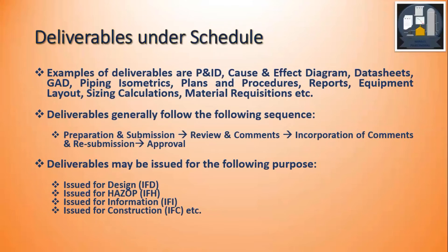The deliverable generally follows the approval sequence described previously. Every deliverable has an objective, and it may be issued for the following purposes: Issued For Design (IFD), Issued For HAZID (IFH), Issued For Information (IFI), Issued For Construction (IFC), etc.